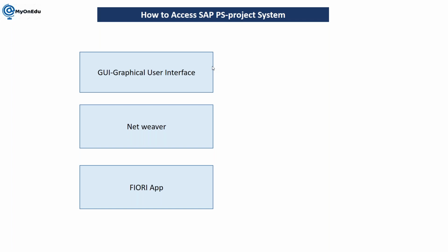Any question, please? I saw one slide where you said sales orders will be created first, then projects, right? Sales contracts. Yes. When we don't define a WBS element or project definition first, then how can we create a sales order? Because we have to assign the WBS element in account assignment, right? You can assign it at a later stage. The system will allow it. So we have to go again to the sales order and assign it, right? Yes. Okay.